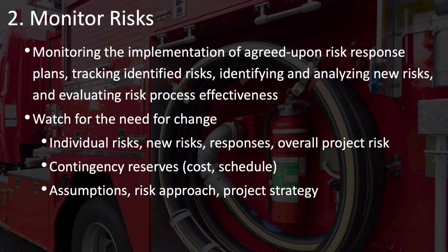As part of monitor risks, you'll need to keep an eye out and watch for times when you need to make changes to your risk management by watching out for the need for change in individual risks and new risks that come out, changes that may need to be made to your risk responses and to your overall project risk, keeping an eye on your contingency reserves for both your cost contingencies and your schedule contingencies to make sure that those are adequate, and checking to see if you need to change your assumptions or your risk approach, or perhaps even your project strategy.